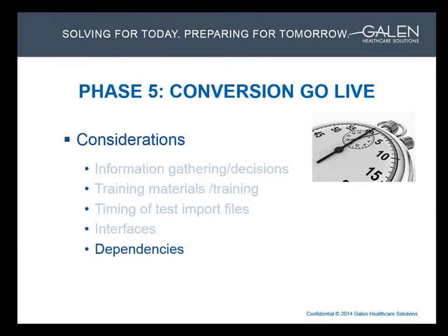Now we get to our last one here on this slide, and that's dependencies. Always important to keep an eye on are those tasks that must be completed within a certain time or before another task can be completed. So on a big note, it would be, import files must be created before the conversion can be done, of